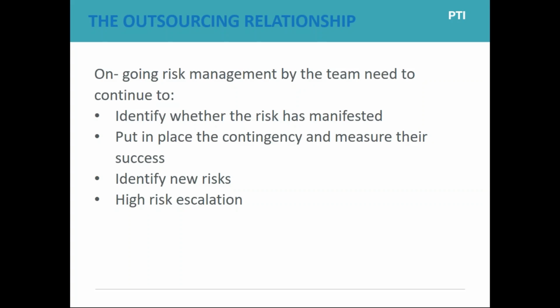So as a sponsor, you will look at what are the risks to you for outsourcing, whereas jointly with your service provider, you can look at what are the risks for the deliverable. And these are your regular project risks, but the service provider will have a different perspective. Because you've outsourced it, you may not be as close to all of the risks in your project. So if you can perform risk management of the project jointly with your service provider, then you are more likely to have successful risk management.